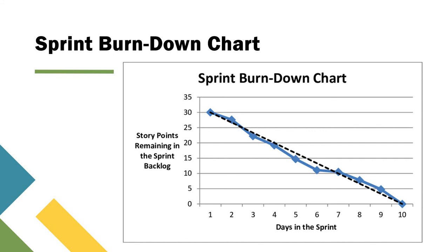The product owner and the Scrum Master will have regular discussions based on the burn down chart. They will discuss that for this particular sprint, these many story points are remaining, and suppose for sprint 3, all the story points have been completed. Like that, they will have a comparison and discussion.